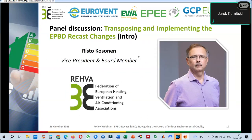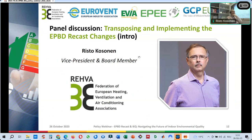Next panelist is Risto Kosonen, REFA board member. We are planning to implement a lot of technologies in buildings, but there is a challenge that not all of them are working as designed. This requires commissioning — done well — covering not only the handover phase but from pre-design to occupied buildings. This brings back the demand for monitoring and data analytics to see how systems actually work.